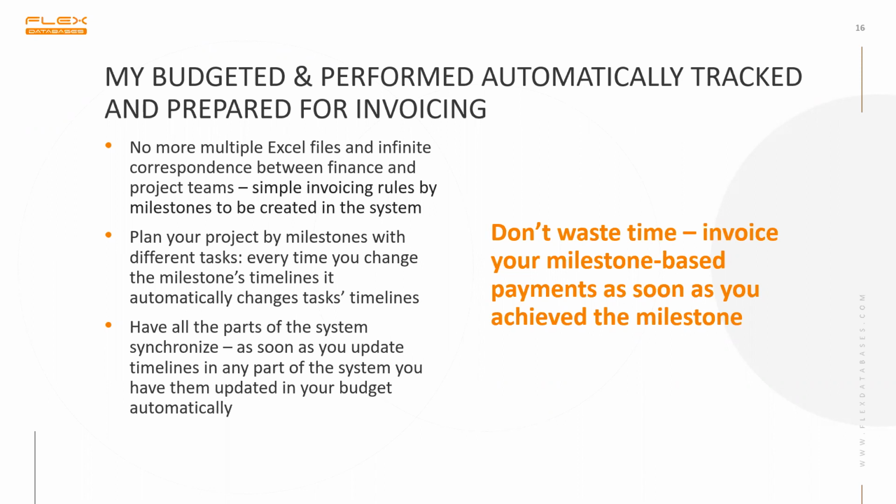And in order to avoid this headache, we have implemented milestone-based invoicing rules in our project management and budgeting module. And what does this bring? First of all, it brings ongoing and timely cash flow management. Second of all, your finance team will not have to reach out to the project managers to find out if any milestone is achieved, because the system will reflect the data immediately. Let's say your site indicated the first patient in date in the investigators and site management part of CTMS, and at the exact moment, your finance team will see this date in the project management and budgeting module.